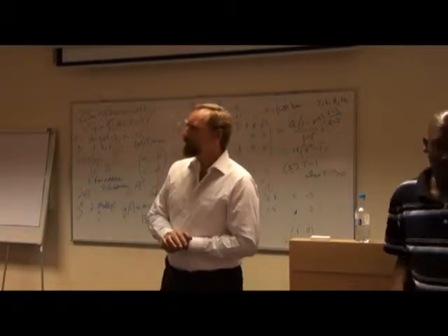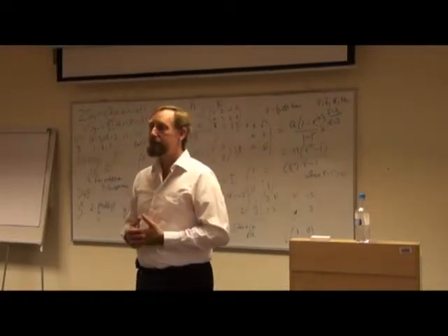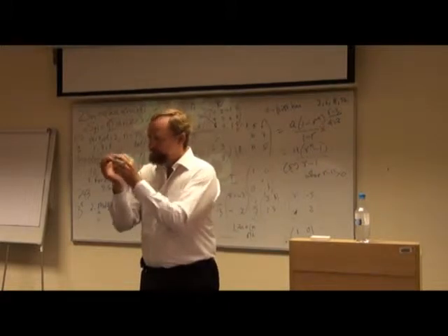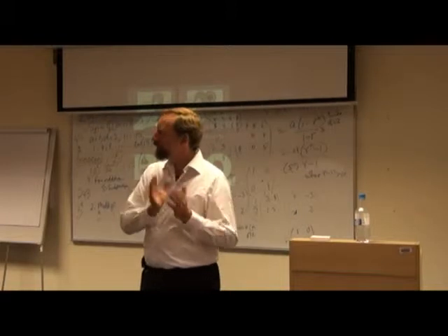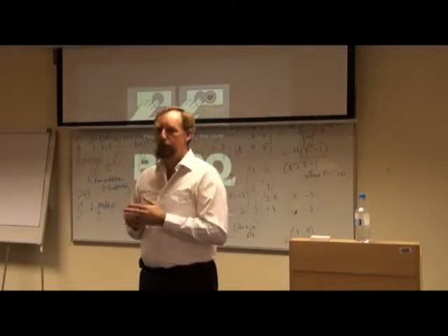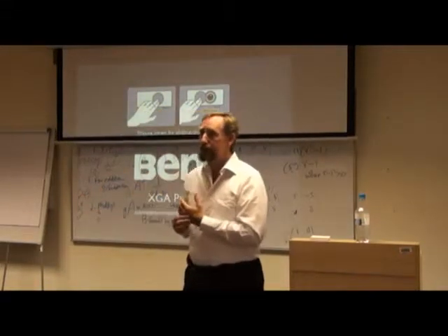So in the consortium agreement, I will have a checklist of items that you need to take into account there. There you agree between the coordinator and the other partners how you distribute the money, how you report, what happens if, what the responsibilities are, who gets how much money, and all the intellectual property issues that I will discuss in a minute.